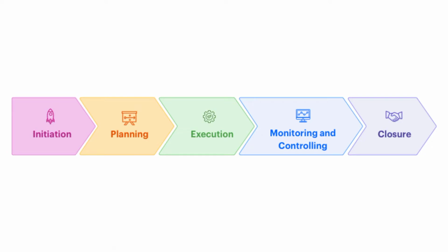Your change management plan will decide the success or failure of your project. There are 5 main phases in a project: initiation, planning, execution, monitoring and controlling, and lastly, closing. But change can occur during the execution, monitoring, and controlling phases, and it happens against a project baseline, which is a detailed description of the time, cost, scope, and quality of the project that you have determined when planning.